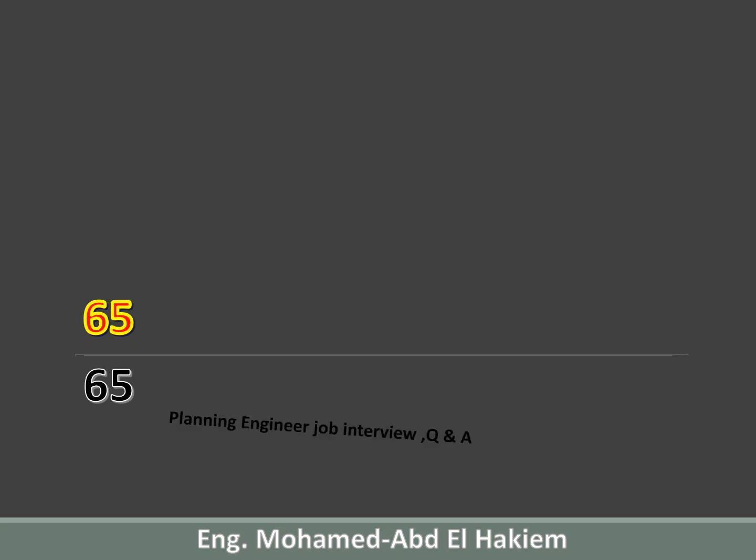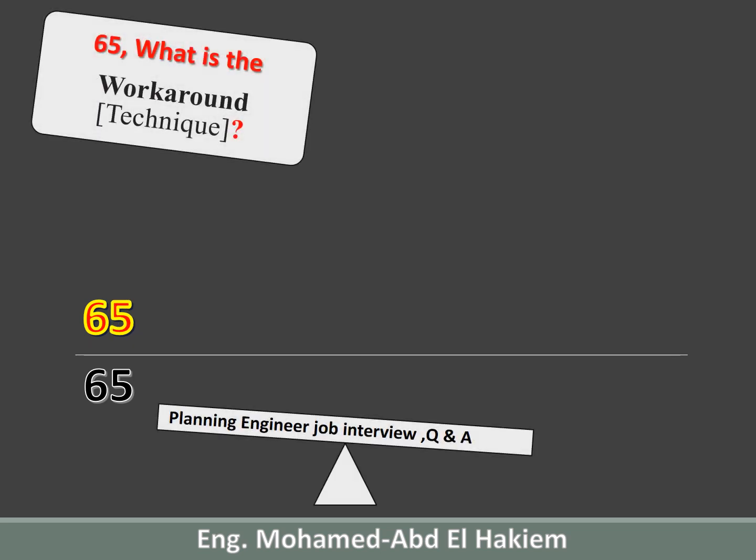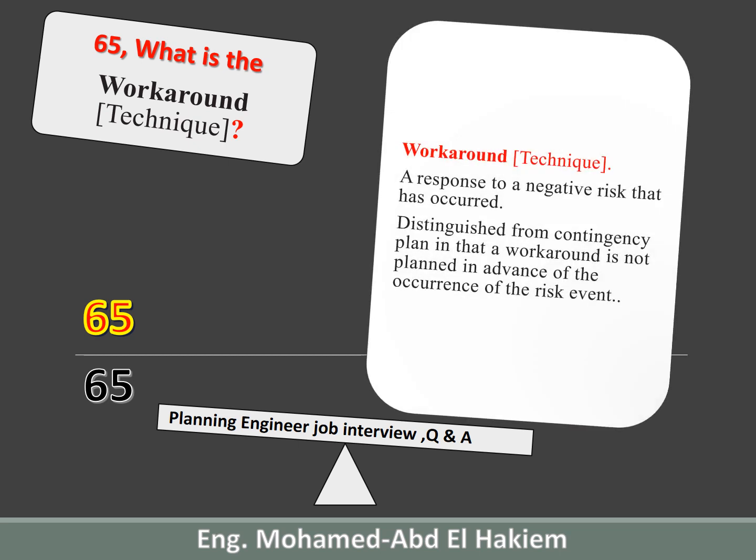65. What is the workaround? Workaround, a response to a negative risk that has occurred. Distinguished from contingency plan in that a workaround is not planned in advance of the occurrence of the risk event.